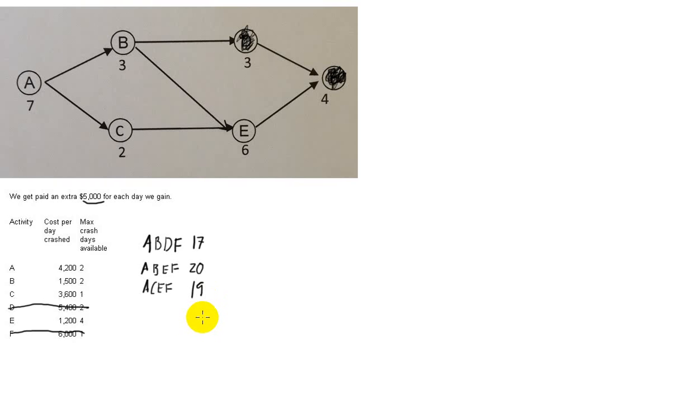Looking at what we've got right now, the longest path is the A to B to E to F, which takes 20 days. So if we're going to speed up the project, we have to speed up at least one of the critical activities. Now, we know that F can't be sped up. Out of A, B, E, and F, let's look at the possibilities.